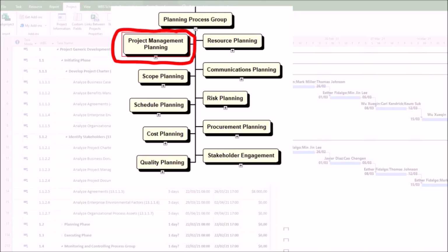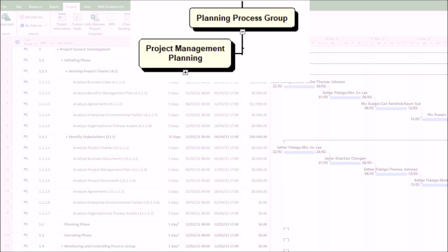The Develop Project Management Plan process is extremely important within the planning process group because it serves as the foundation for all project execution, monitoring, and control activities. Here's why it's essential. 1. It integrates all planning efforts. The project management plan combines and coordinates all subsidiary plans, such as scope, schedule, cost, quality, risk, etc., into a single, cohesive document. It ensures alignment between different knowledge areas and avoids conflicting approaches.